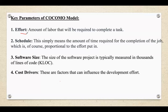Effort is the output of the model, calculated by considering both the size of the software and effort adjustment factors. It indicates how many person-months are needed to complete the project. The second parameter is schedule — the estimated time to complete the project, often measured in months. The model estimates the project schedule based on the effort and the productivity factor. The third parameter is software size, usually measured in lines of code, where thousands of lines of code is represented as KLOC.